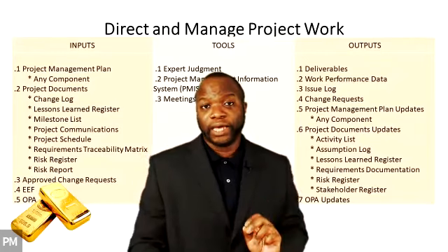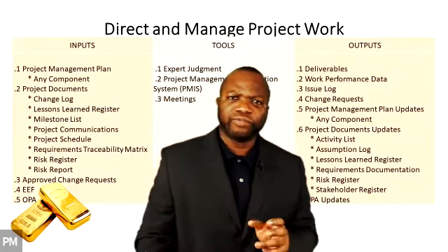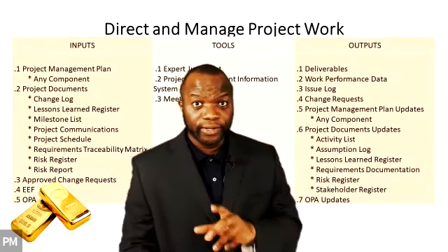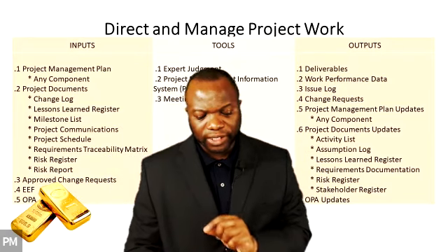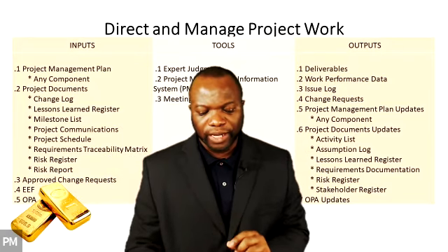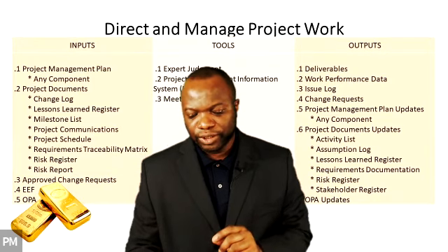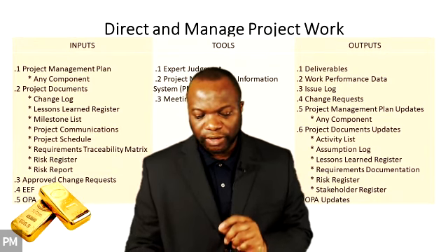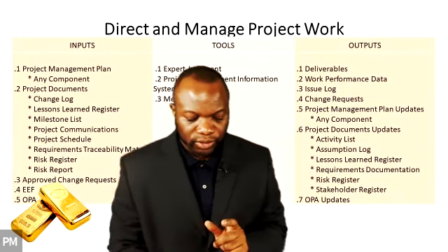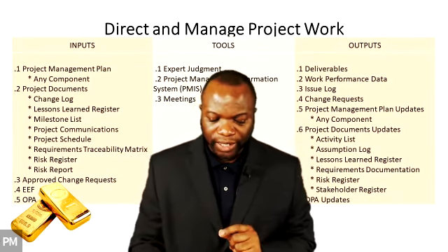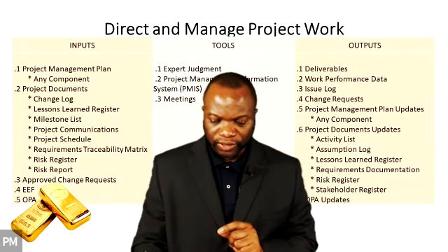Once we do it here, we will not continue doing it ad nauseum. We'll just make mention of it. Oh, those are those updates, and we'll move on. So take a close look. Page 97, the top, it says, any change to the project management plan goes through the organization's change control process via a change request. Any component of the project management plan may require a change request as a result of this process.